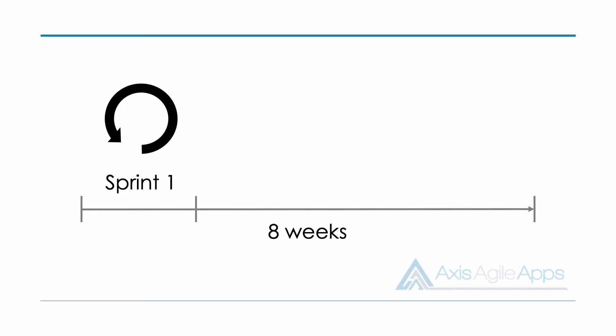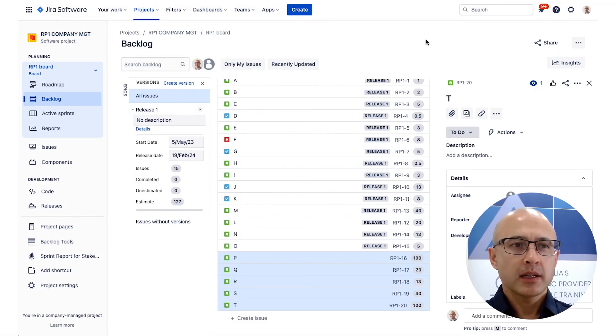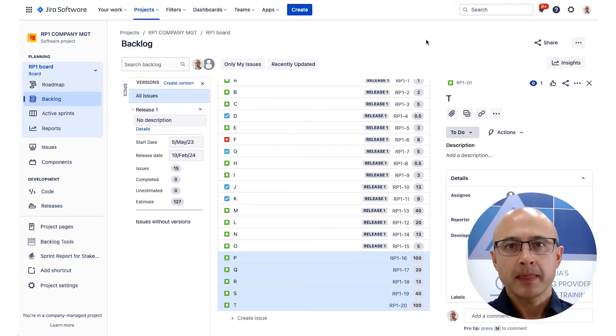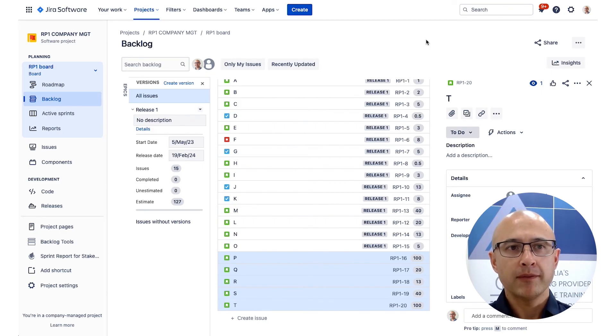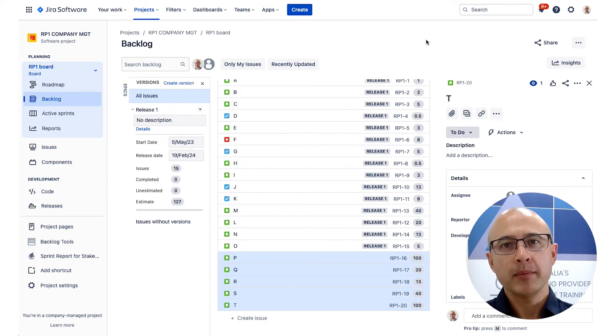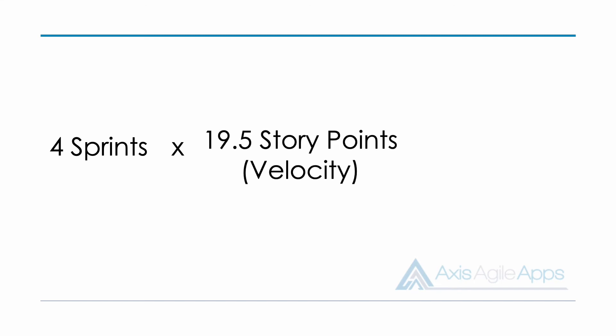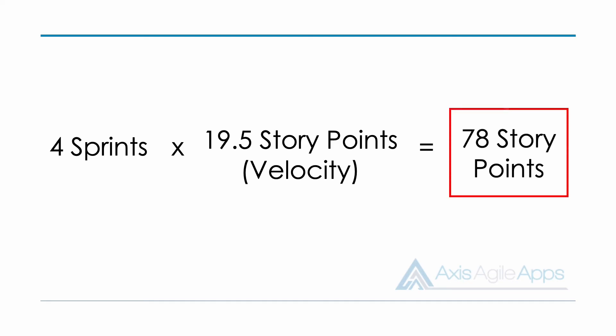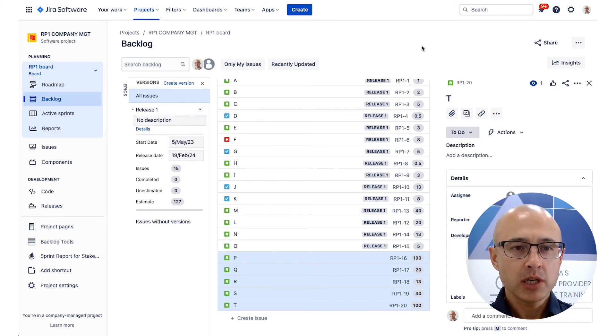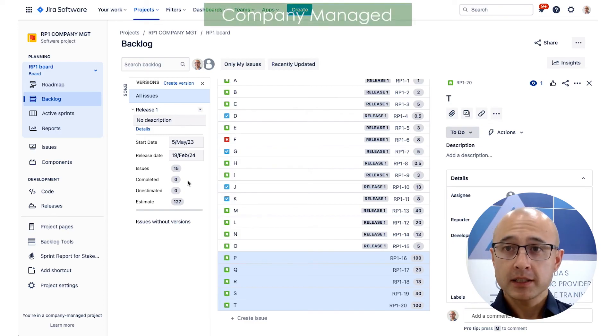Now, at this stage, you might want to think about a buffer or not. But in this case, I'm just going to assume, okay, maybe our team can get through about four sprints worth of work. So if we've got four sprints, then we can calculate how many story points they'll potentially achieve. So we're going to go four and multiply it by the team's velocity, which is 19.5. So four multiplied by 19.5 is 78 points. Now, with this 78 points, we're going to go back to Jira, and we're going to drop the number of points that have been assigned to this release below that number.